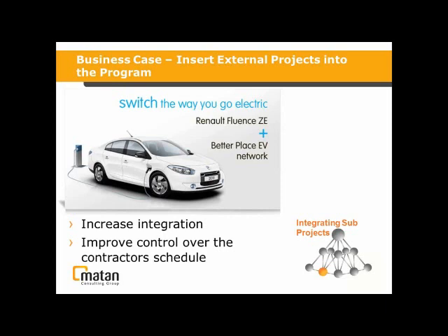And then he can either approve the changes, or he can turn back to the project managers from the different companies, from the subcontractors, and talk to them about the changes and maybe renegotiate some of the dates and make sure that maybe they can pull in some of the projects and so on. So this is one scenario where in a program you want to see one picture in one place, and the process and the tool that I'll show you later on can really help you with that.